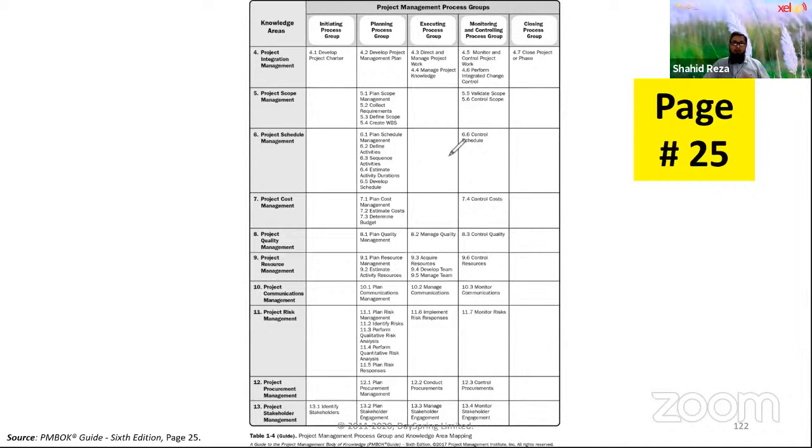All right. Now, if you see the knowledge areas, only integration management is the knowledge area where there are one or more processes that cover all the process groups. Have you seen this? In other knowledge areas, you are not seeing this. For example, in scope, only 2 process groups are covered, but 3 are blank, right?